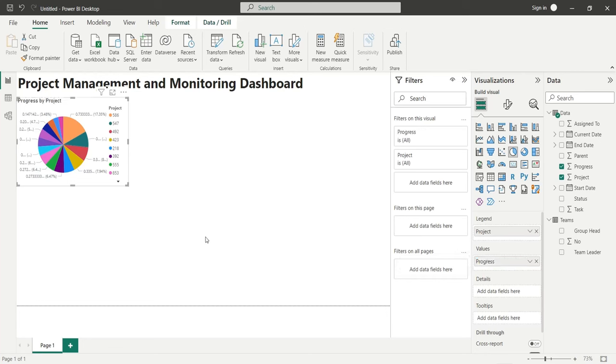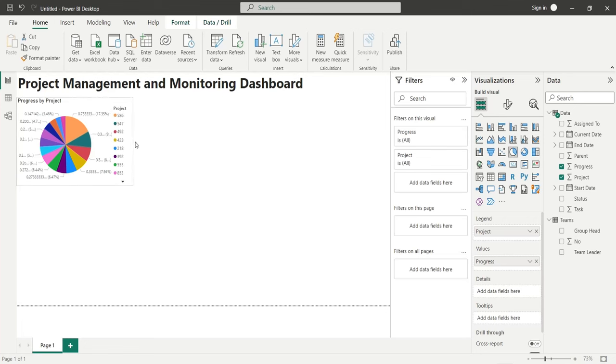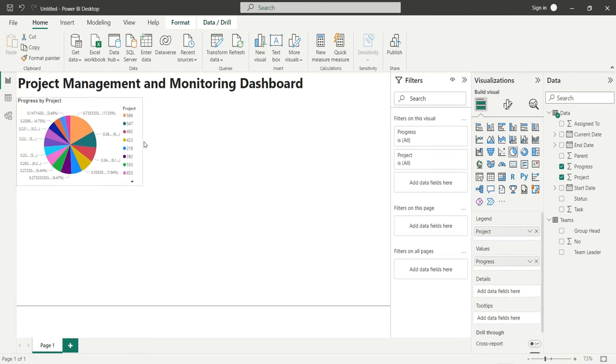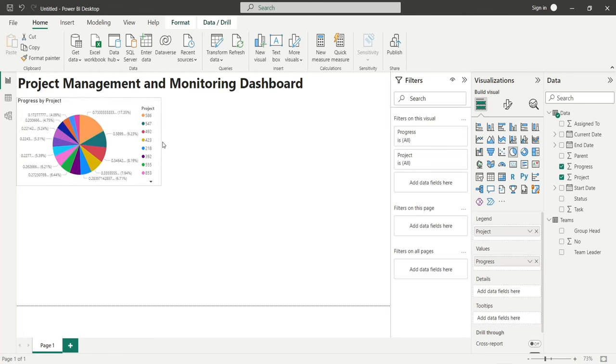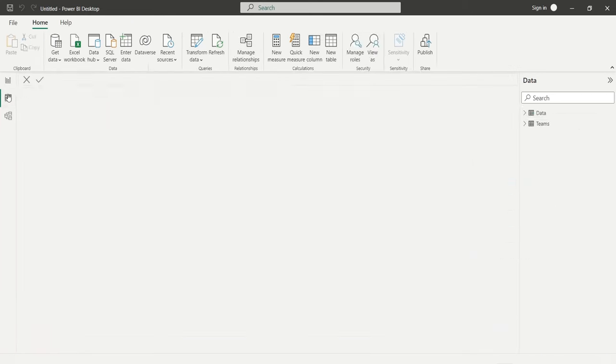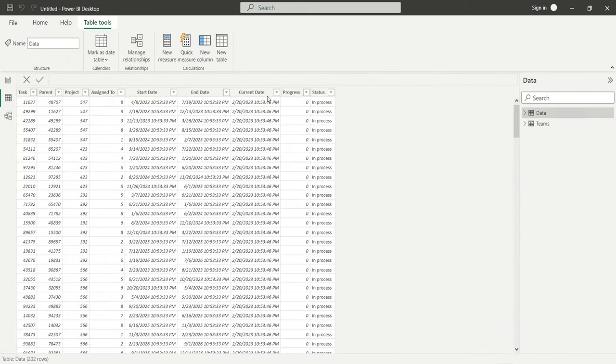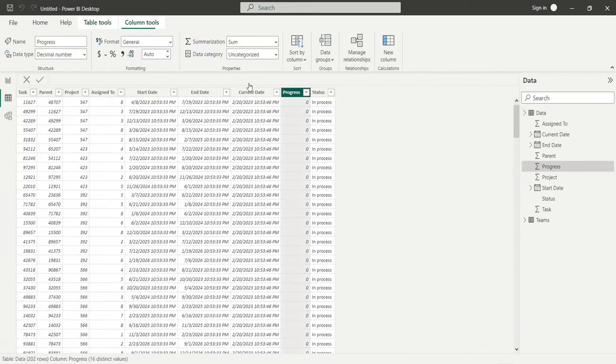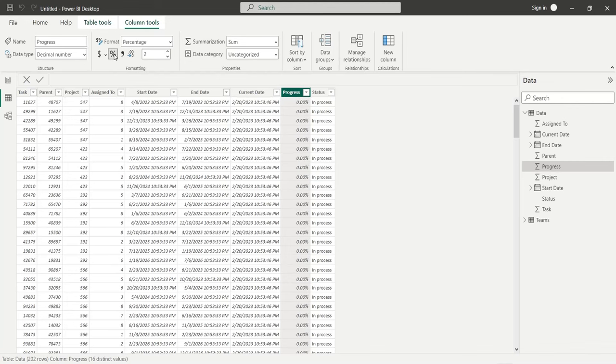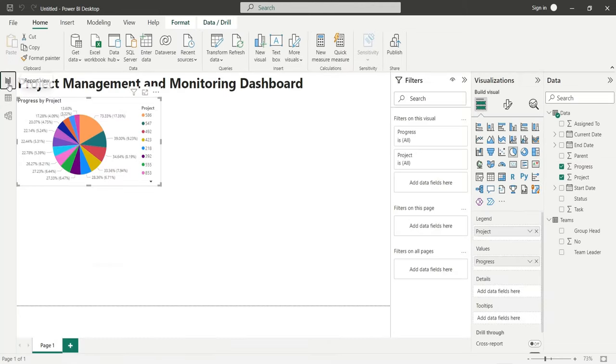You may have noticed that the progress values are not correctly displayed on the pie chart. To correctly display the progress values, go to the data view. Change the format of the progress column to percentage. Go back to the report view and see the results. The values are displaying fine now.